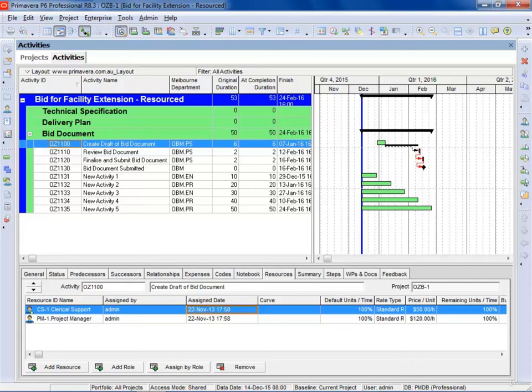All activity data must have the activity ID in the WBS code. Remember the delete record flag. That will delete any record, and you can therefore delete relationships or activities with that delete record. And it must be placed against any line that you want to delete on import.